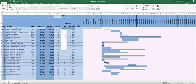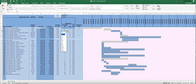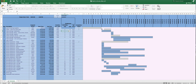You can change the controlling step using a dropdown. For example, the table settings and tablecloths are currently depending on task two. If I change the controlling step from two to one, it pulls that task back to align with the end of step one. You can see it shift left immediately, lining up right at the end of task one.